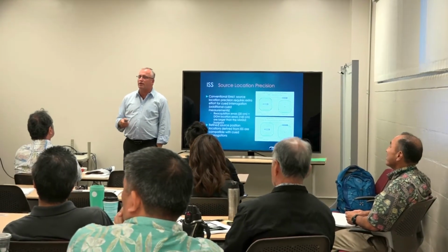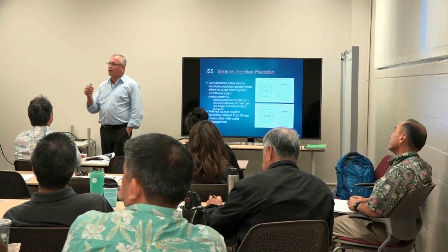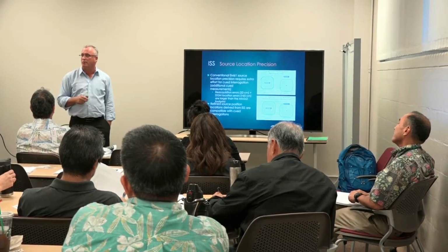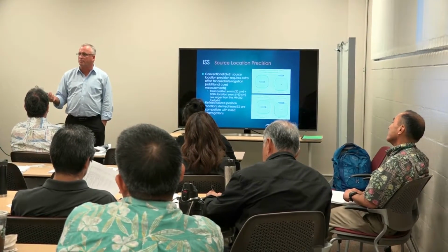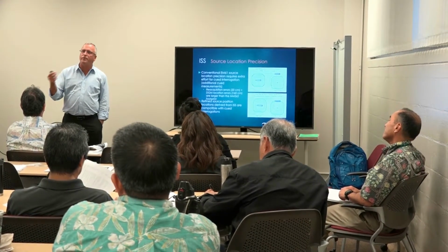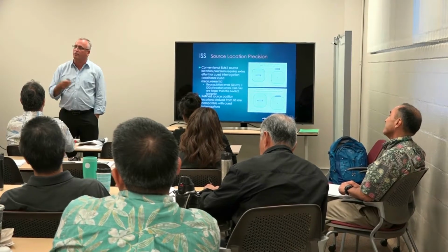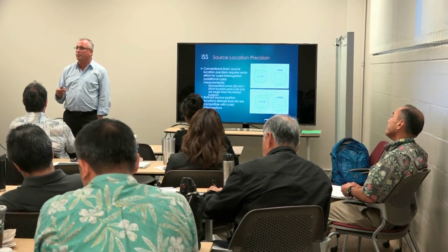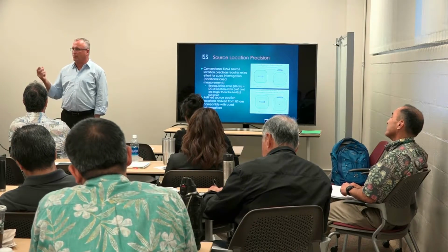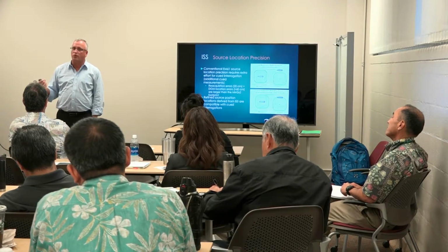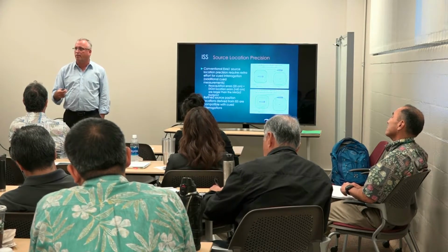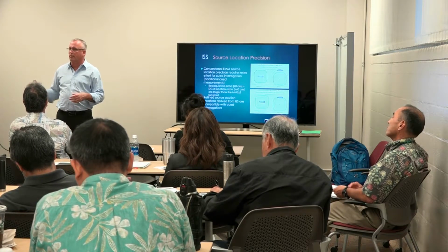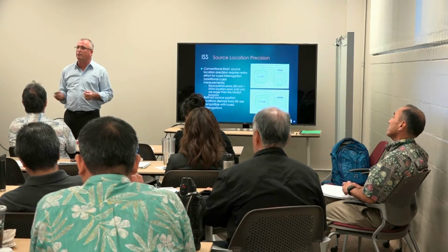So, keep in mind, to the extent that you can provide enough information to bound their risk, it's important, right? Or take some of the liability out of their hands and documents, because you're building in a lot of contingency. That gets crazy. It's just a waste of money, right? So if you take the risk, because it's a risk that's there, somebody has to take it, right? If you make the contractors take it all the time, you're going to get high prices.